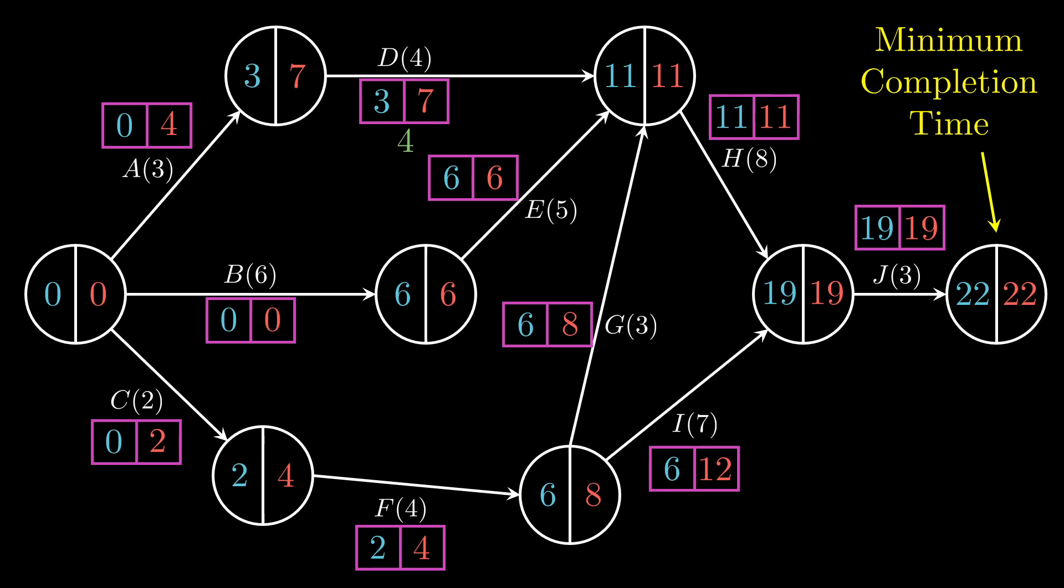So we can do the same simple calculation with just subtracting the blue and red numbers to find how long everyone can wait for, and we get all those float times in green there.